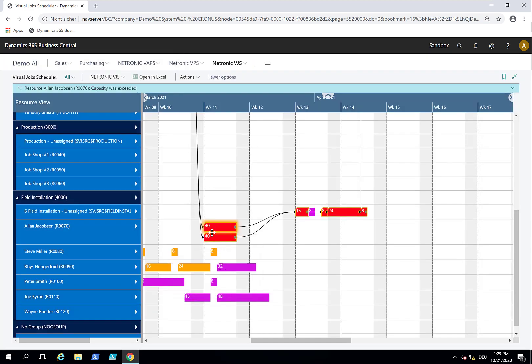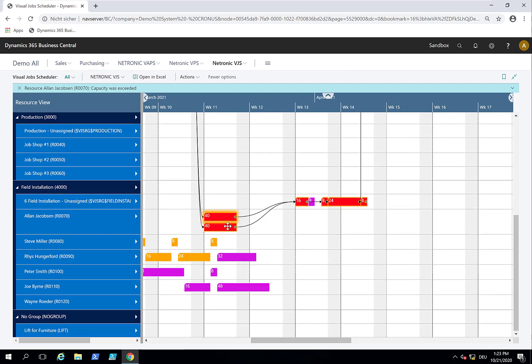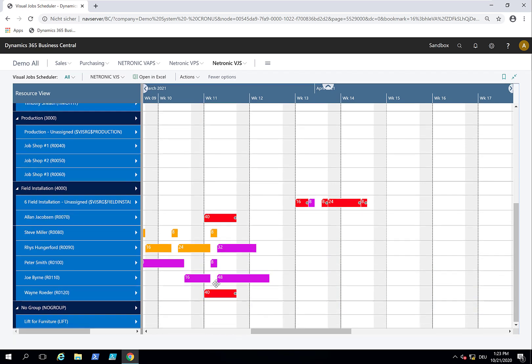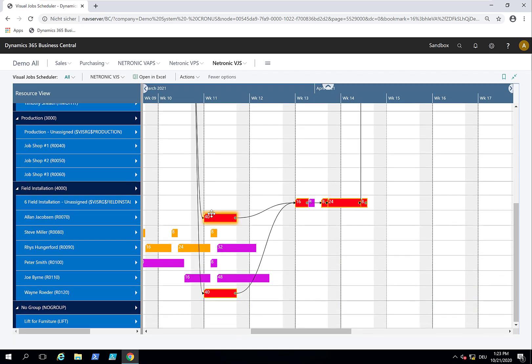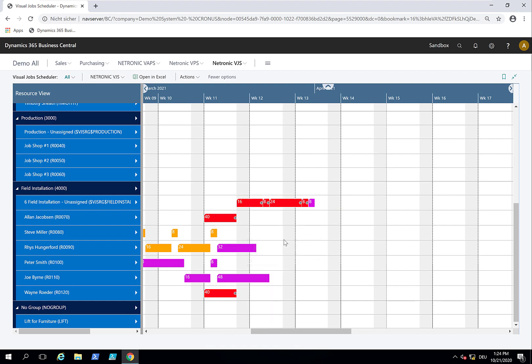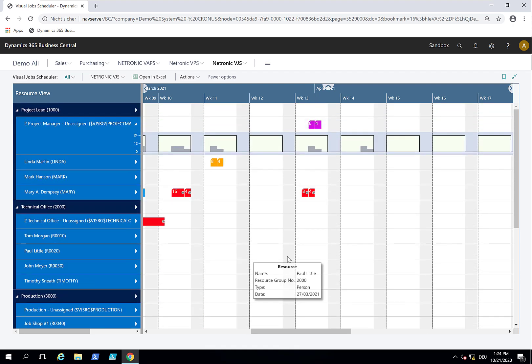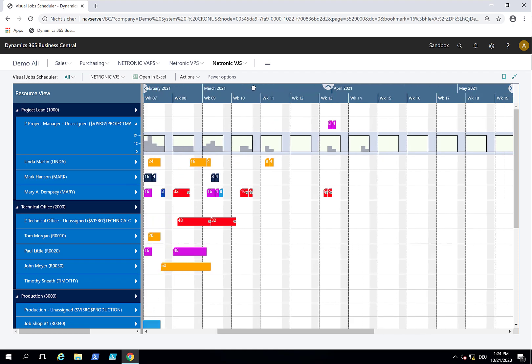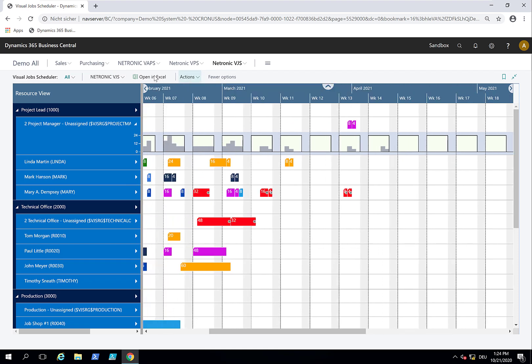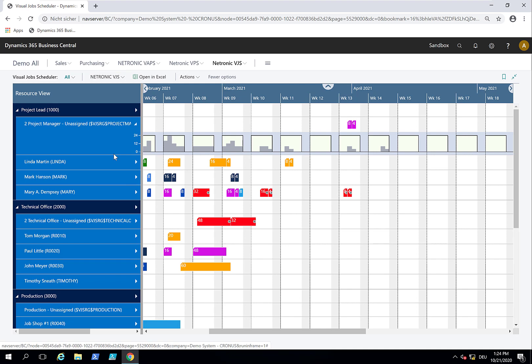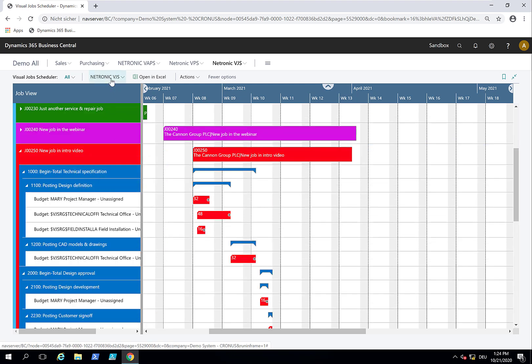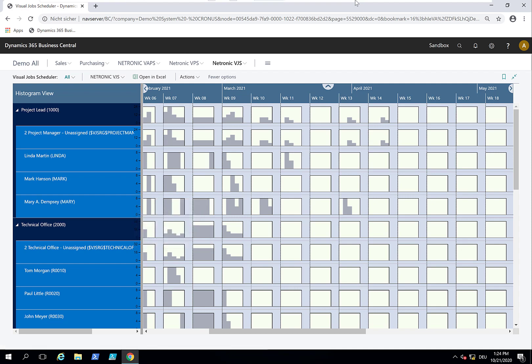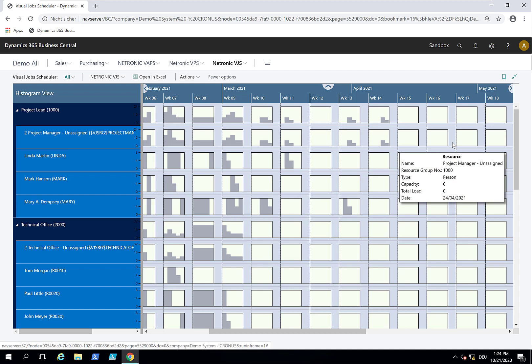This creates a new job planning line. The cool thing is it copies the links so we keep the structure. I move it to Wayne from Alan so they can work in parallel. If I want to close this gap, I say schedule successors, and everything is brought forward so we get this done as soon as possible. With the VJS in the resource view, you can do proper resource scheduling. In the project or job view, you can do time scheduling. You can also monitor the utilization of your resources with the histogram view.